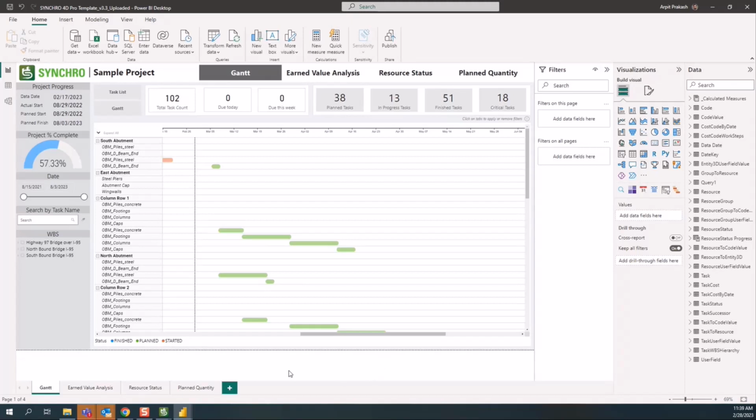But at least with 3D, we can bring in that 3D iModel here, and we can use the iModel's EC instance ID, the unique identifier for each of those elements, and connect it with the IDs from 4D Pro, so that when you select an element, let's say I select my parasteel, that 3D view will show you the filtered view of all your 3D model pieces connected to that task. I don't have a template set up for that just because not every Synchro user is going to have access to the Connect platform, and that's additional licensing and whatnot.